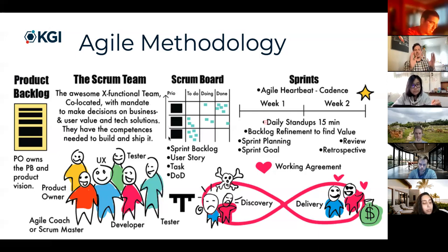So again, fixed timeline. If I don't get these 3 things done, and I only did 1, then that 1 thing is the only thing I'm going to roll out to my customers. And then these are all driven by my user story. And then I'm creating my tasks based on that.